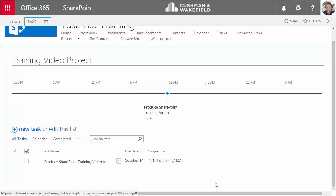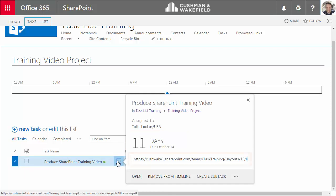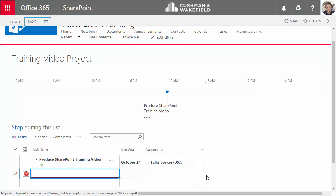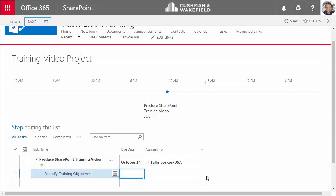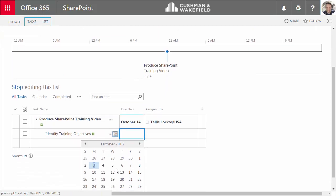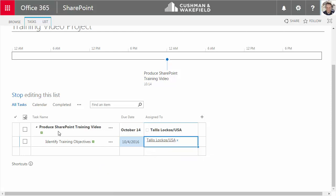So this is my summary task. And now I want to create some subtasks for this summary task. These are the tasks that will be part of this project. When I click on the ellipsis of this task, I can see when the task is due. There's a hyperlink for this specific task and some menu options. I'm clicking on Create a Subtask. I'll name this subtask Identify Training Objectives. I'll choose a due date, and tab over and assign it to myself. I'm going to stop editing.